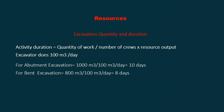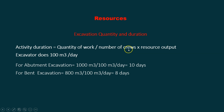For excavations, if you have one excavator and the excavator can do 100 cubic meters a day, the abutment excavation quantity is 1000 divided by 100, giving you 10 days. For the bent you have 800 divided by 100, giving you 8 days. So the duration equals quantity of work divided by number of crews and how much each crew can do.